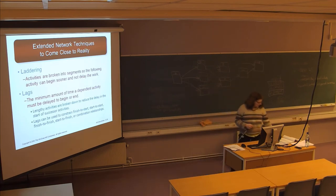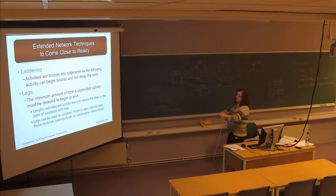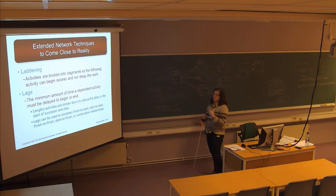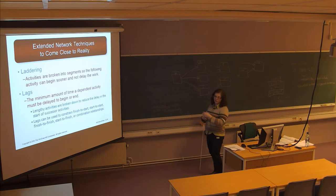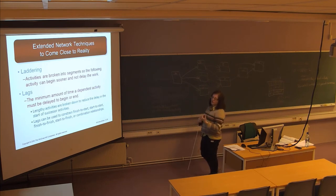An example of laddering is digging a trench, laying a pipeline, and refilling it. If it's a mile-long pipeline, you dig one-third of the trench, then start laying the pipeline while digging the second third. When digging the third section, you're laying pipeline in the second section and filling the first. You don't dig the entire mile first — you break activities into sections and do them in parallel.